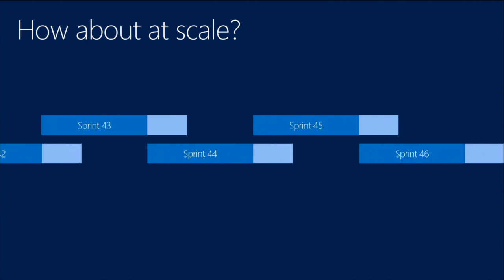Okay, so the question is, when do they make the sprint videos? Yeah, so we have a goal that the sprint videos are sent out within 3 days at the end of the sprint. So the sprint ends on a Friday. By Wednesday, everyone should have sent out the results email and done the sprint video. It's part of the first week of the next sprint.